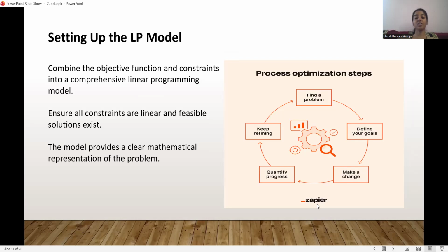exceeding available resources. The problem is first formulated as a linear programming model where each activity is represented by a decision variable. The objective function expresses the total profit or cost as a linear combination of these variables, and the constraints represent the available limits of resources. For example, if labor hours, machinery hours, and material budgets are limited, each project consumes a specific amount of these resources per unit output, and these consumption rates are used as coefficients in the constraints.